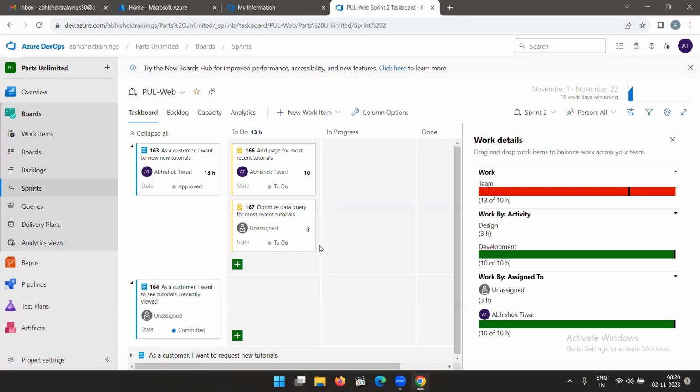Correct. Super. Now, this is only for one user you have shown. So in capacity, you will be setting that as a Scrum Master, for the other users as well. That is what I was targeting in capacity. So if we add all the leaves and capacity of each, this number will keep increasing for the team, the cumulative of all those things. Yes. Perfect. Right. Now, sir, this is basically a job of the Scrum Master, not the DevOps. Yes.